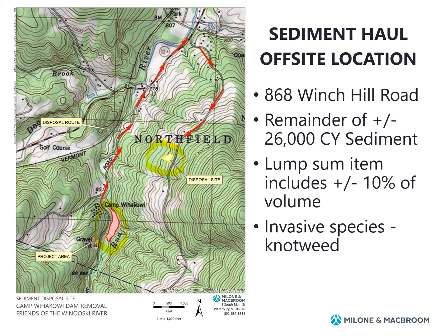We understand that that volume may be a little off, so in the lump sum bid item, please assume that the volume includes plus or minus 10%. And also please provide a cost per cubic yard estimate for any of the river sediment that falls outside of that plus or minus 10%.